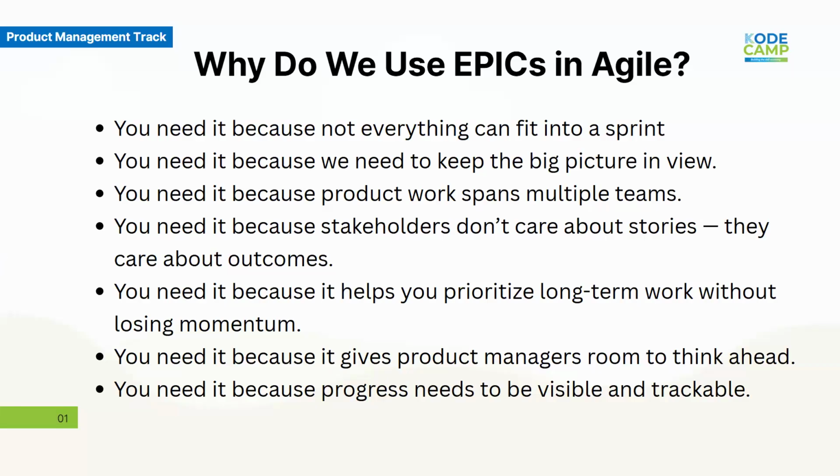You're going to work on some features that are very huge. And I'm not talking about just changing maybe a color or some typo. I'm talking about full-blown features. It could be redesigning the dashboard, integrating a payment gateway, or building an onboarding flow from scratch and so on. Now, these are big and they are not going to get done in one sprint, right? You might have to break them down into 2 to 3 sprints, right?